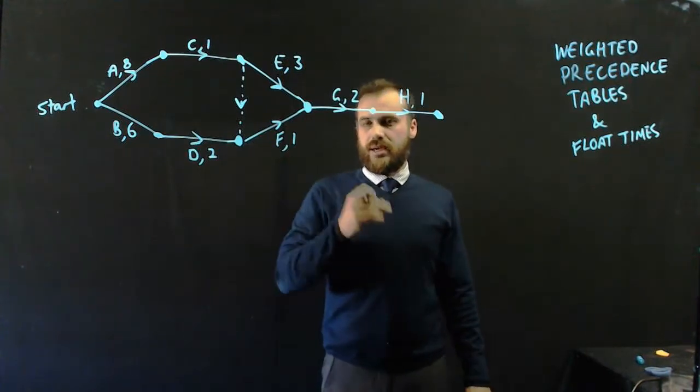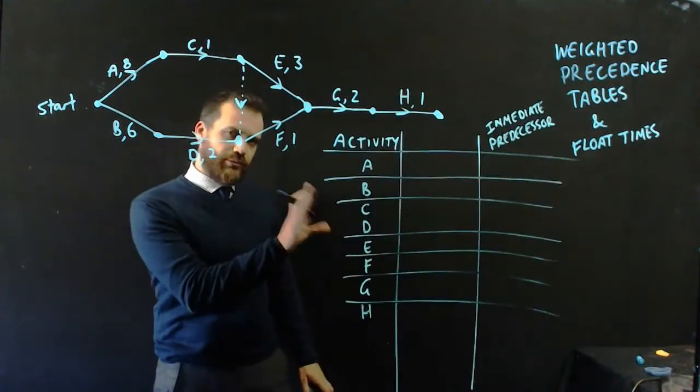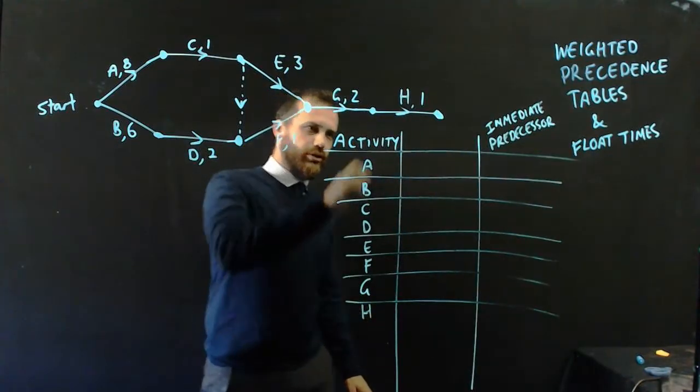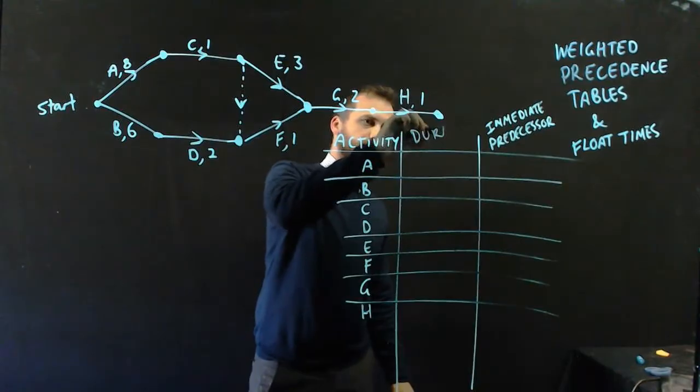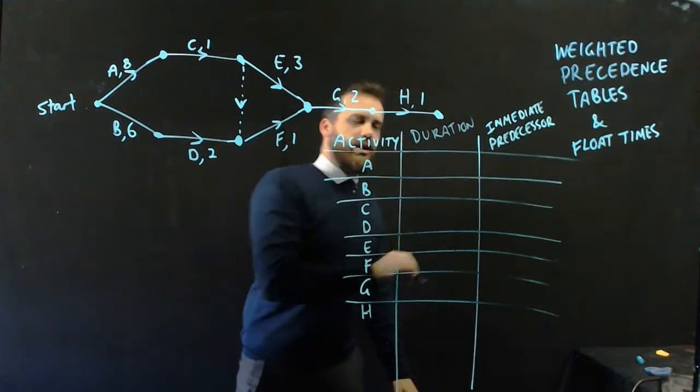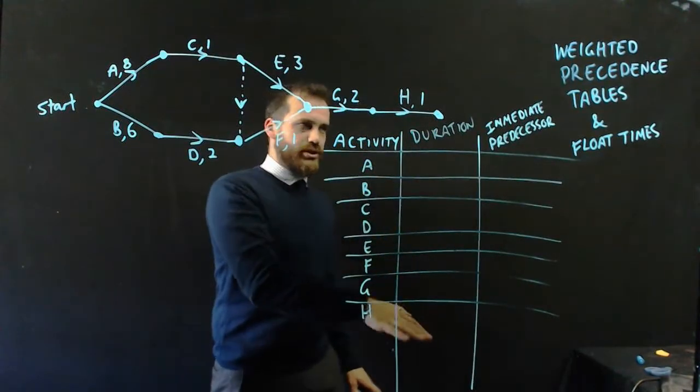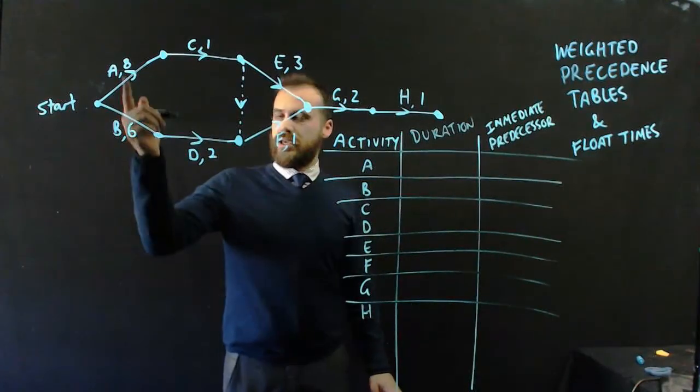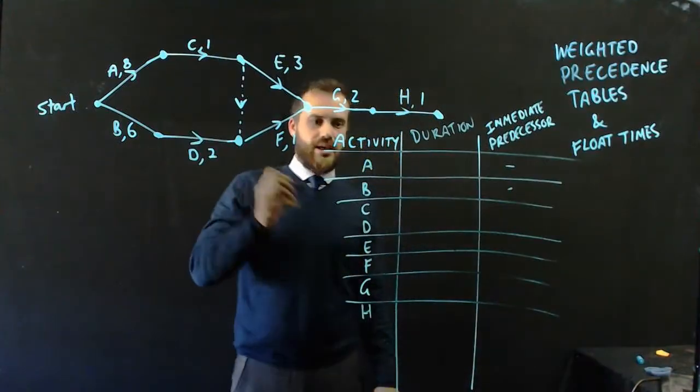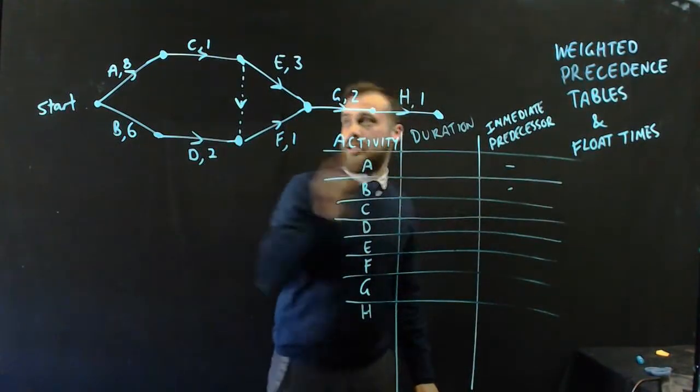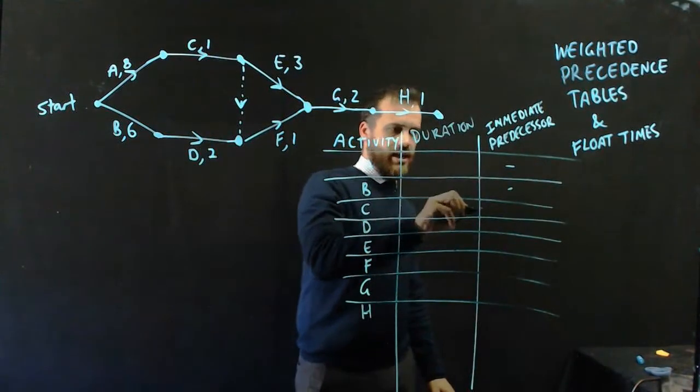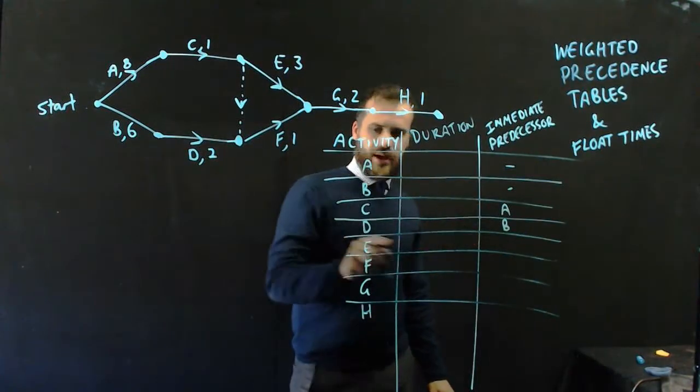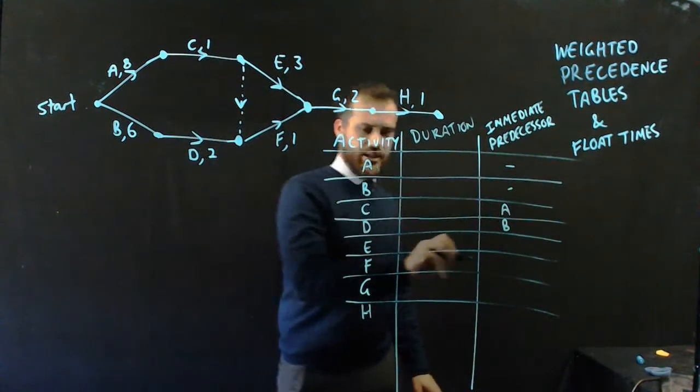Now, we're going to create a precedence table. So you should be familiar with these, but I've put another extra column in the middle. Now, that column is going to count for something called duration. I'm going to ignore that middle column for a second, I'm just going to finish doing my immediate predecessors. So A and B are at the start, so they have no immediate predecessors. C has an immediate predecessor of A. D has an immediate predecessor of B.